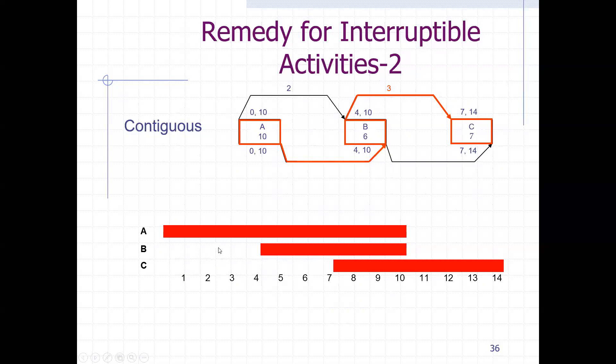So we are good in this manner, since two here is less than four, which offers us a lot of time, which is four days for B to start. Now for C and B, they are flexible on the finishes, finish-to-finish. So as you can see here, B and C don't have to end or be done at the same day because it's flexible from the finish-to-finish relationship. And for C must start at seven days and finish at 14, while B must finish at 10.